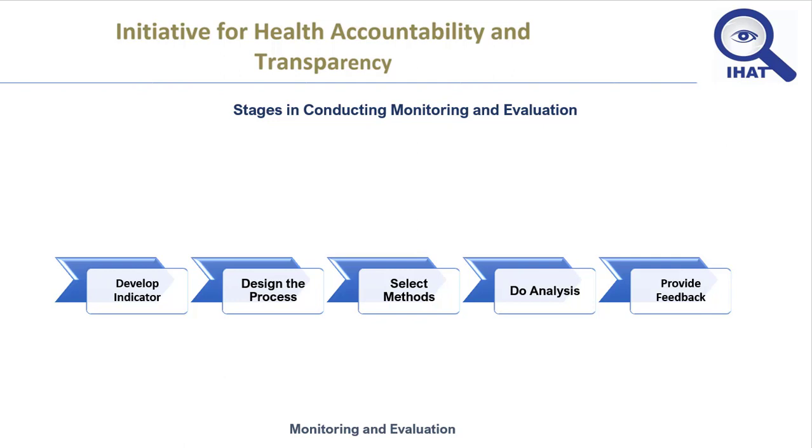Both monitoring and evaluation require a means of assessing the changes or results produced as a result of an intervention. The development of good indicators requires clarity about the purposes of the intervention. Indicators should therefore be directly related to the goal, aims, objectives, and activities set out in the intervention planning documents. Depending on the intervention, indicators may include variables such as attendance rates, the proportion of people with knowledge of a certain subject. The next stage has to do with designing monitoring and evaluation.